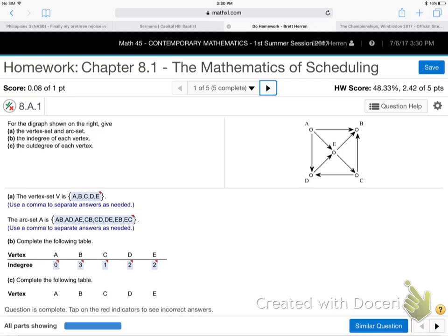The tool we're going to use is called a digraph. Di stands for directed graph. Basically, it's a fancy way to say arrows. We're going to have an arrow diagram, a bunch of arrows up there. Why arrows? Because one job will lead to the other. Like the plumber, when he gets his work done, or the person who gets the walls up, that'll lead to the roofer in real life, right?